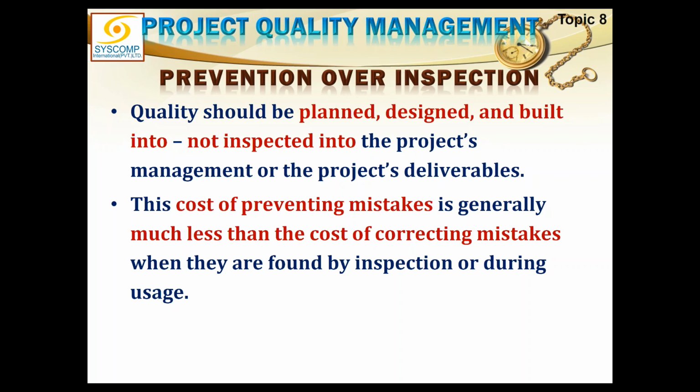So if we are trying to build quality into the system, that will actually cost us extra. Maybe we want to ensure that our people are professionally trained. They have developed their processes. They are properly documented. They are following those processes. They have proper training and guidance and coaching throughout the session, throughout the production. So these things do matter. These things are measures which are preventing the mistakes, and we have to spend some money on them rather than correcting the mistakes. If I spend money on putting the things right, that would be correcting the mistakes.